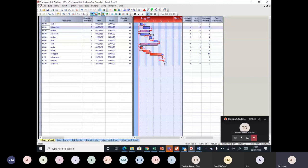We're saying that, let's meet at Topman shop or Top Shop at Westfield. That is our meeting point. He might leave Acne and go on the overground, so he will leave Acne in just 20 minutes and he's in Stratford. I'm coming from Brixton. I need to leave like 4 hours or 2 hours before to be able to get to that point at 2 p.m. So we are finishing the journey together at Top Shop at Westfield, but not necessarily starting together. So that is another dependency that is called a finish to finish dependency.